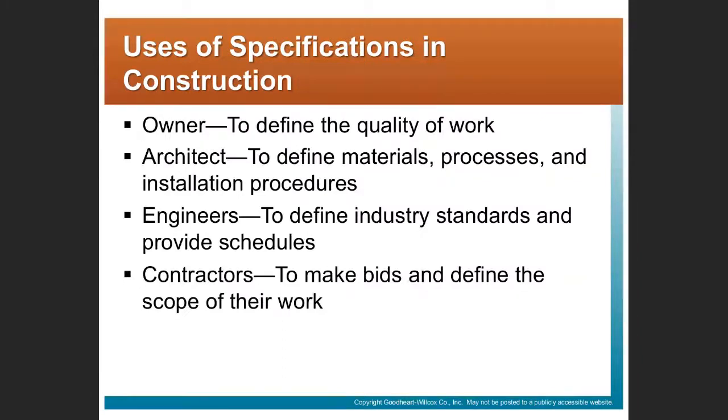Generally speaking, the construction documents describe the what. They tell the contractor what they have to do, what you're going to build, what materials to use, etc. Generally speaking, it's up to the contractor to figure out how to build. The specifications and the drawings generally don't say how. They generally don't specify what's called means and methods. It's up to the contractor to determine means and methods.